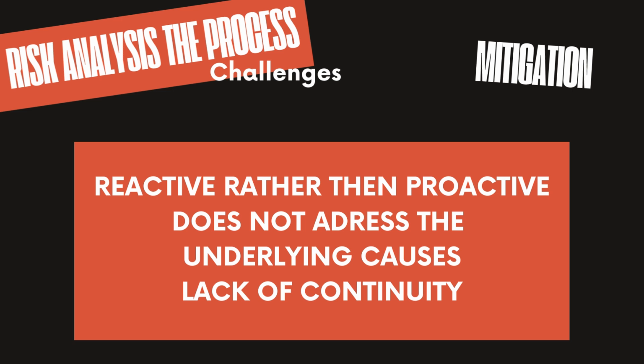Let's say the risk is related to a potential talent shortage for a highly specialized technical role. Simply allocating more budget won't solve the issue if there's a limited pool of qualified candidates in the market. A more sophisticated approach might involve investing in upskilling your current team or partnering with a specialized recruiting firm to ensure you have the talent pipeline in place when you need it.